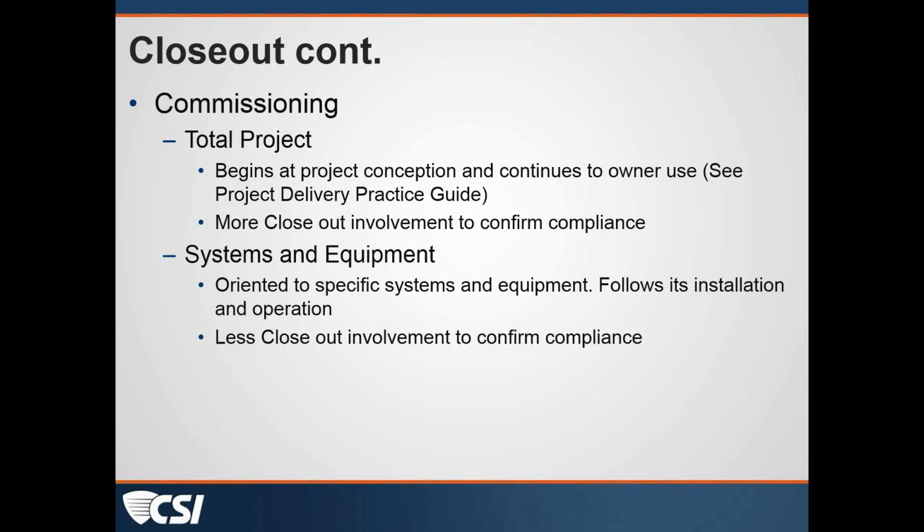Yeah, that's right, and what I like to see is that it has on it the addenda posted that were there when the job started, the requests for interpretation that have been issued, and change order items that have occurred.